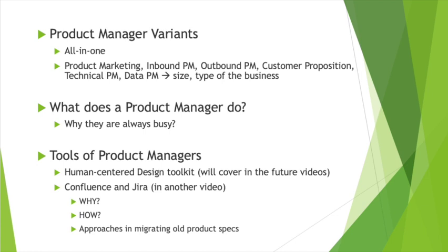Once the user story is completed, the product manager can walk through the requirements with the dev team and the testing team, so that firstly, the team understands the requirements, and secondly, they provide the effort estimation. Once that's done, the user story is ready for the sprint planning meeting. During the sprint planning meeting, we look at the user stories that are done, meaning they have all the details and already have the effort estimation. Then we make a decision on whether they can fit into a sprint, and say, okay, for this sprint we're going to deliver those user stories.